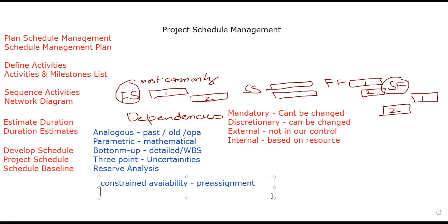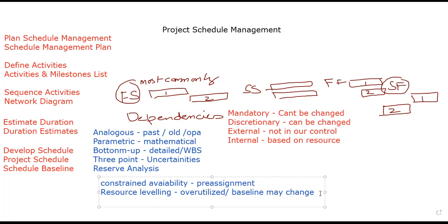Apart from that, we perform resource leveling. If we have overutilized resources, once we do the resource leveling, there is a good chance the baselines may change or will change, because you will change the dates, timings, or you will adjust new resources. So baselines may change.